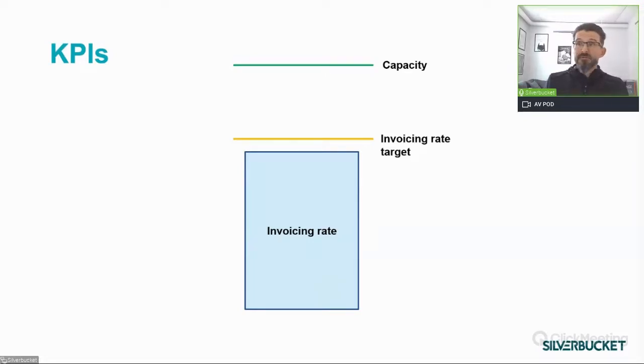The nature of project business heavily affects the visibility of the future allocations. Typically, organizations in professional services are able to get a reliable estimate of the future resourcing situation from 4 to 20 months ahead. Also, the target for the invoicing rate can be set based on the character of the organization.